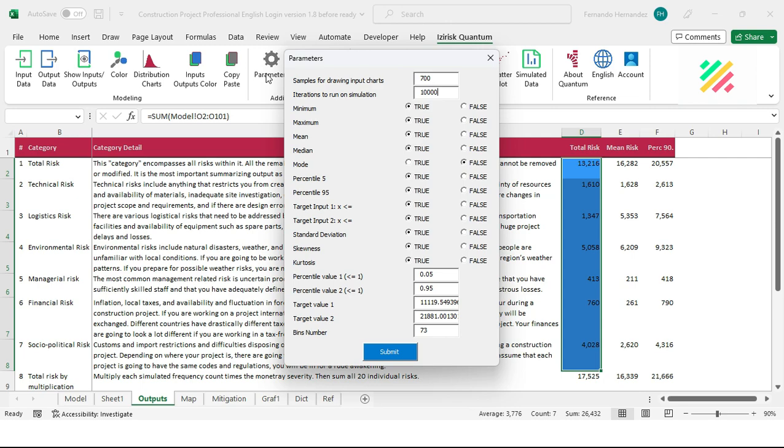On the other hand, precision or convergence is not achieved linearly but with marginally decreasing returns. At first, for example, when jumping from 200 to 1,000 iterations, you will rapidly increase the precision, smoothness, or convergence of your model. But do not expect to increase the convergence of your model much when jumping from 20,000 to 30,000 iterations, where marginal increases on the precision of your results tend to become smaller each time.